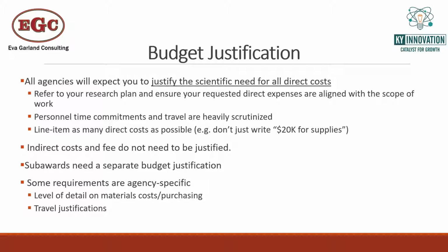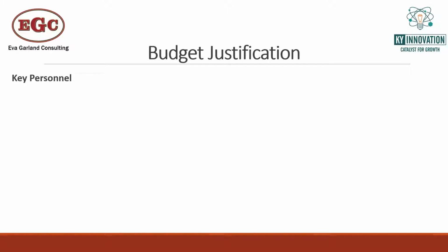Travel justification is very important, and also that the budget makes sense for the travel you're requesting. So it's probably a good idea to take a look at what's going to be roughly the airfare costs, what's the rough per diem for the city you're traveling to for hotels, food and meals, and other expenses. So just make sure that if you've got a one-day trip from New Jersey to New York, it's not $5,000. Make sure that you're reasonable there.